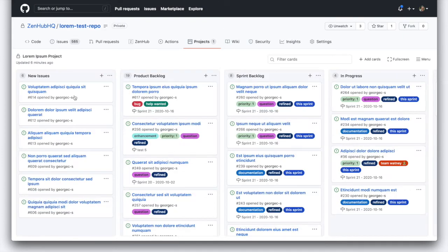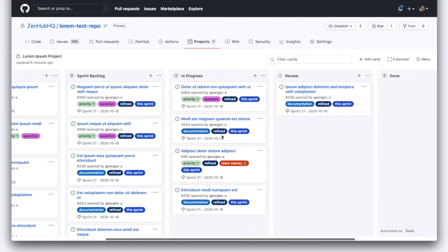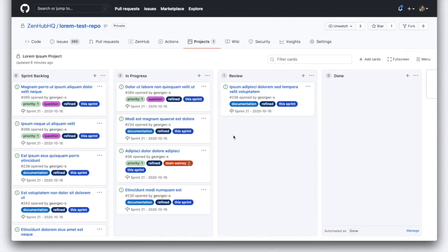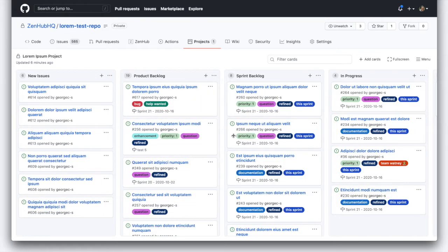Now the first thing you'll notice, these are the same issues that we just saw in the GitHub issue tracker. But instead of just a straight list view, here we have some columns. Depending on how you and your team work, you might set up columns for a product backlog, a sprint backlog, in progress, review, and a done column. You and your team can set up these columns the way that you want.